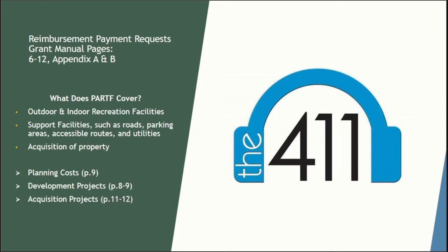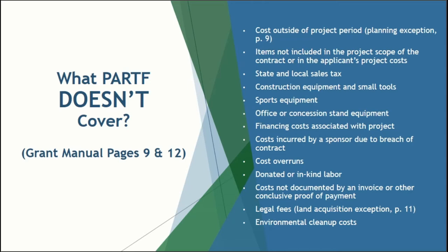Before we move into reimbursements, again, let me stress the importance of reading the manual in its entirety. Before you start your project, make sure you understand what PARTF will and will not cover. PARTF does not cover costs outside of the project period. There is a planning exception. Planning costs such as application preparation, appraisals, surveys, necessary permits, or design costs incurred within 2 years before the application submittal date are eligible.